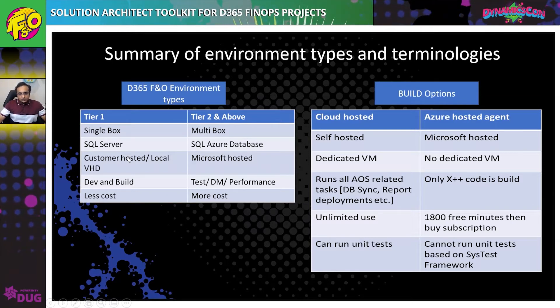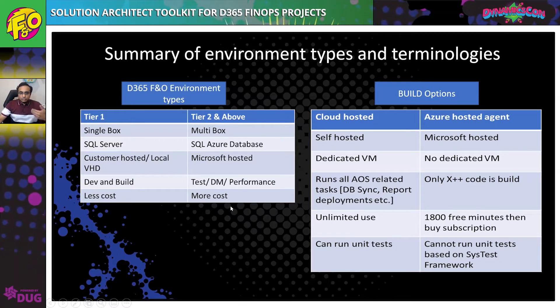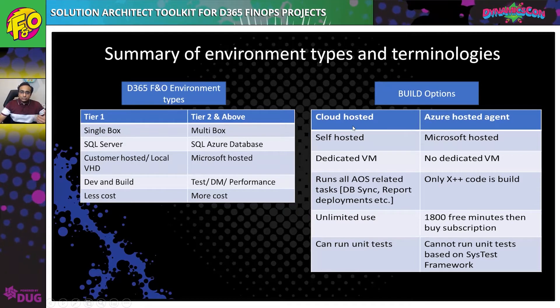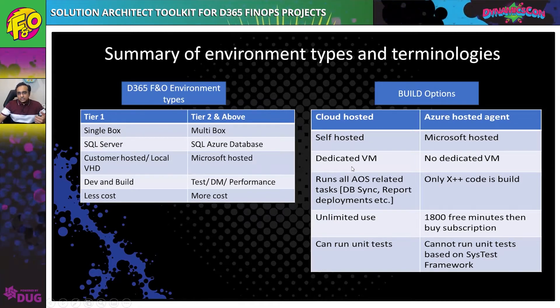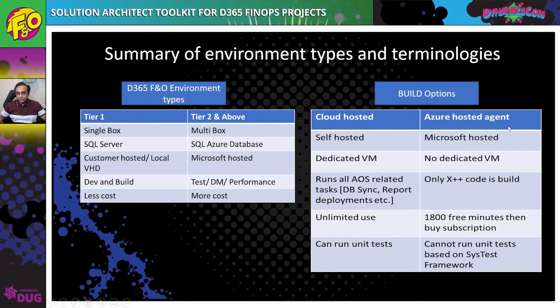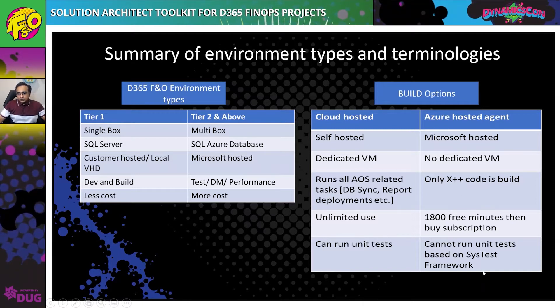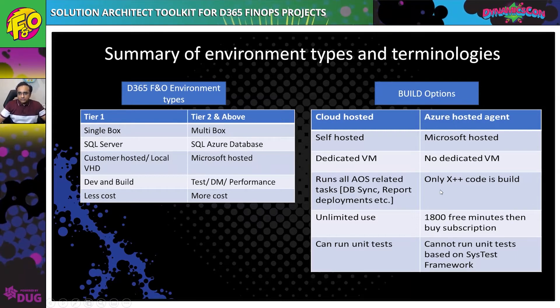Tier 2 and above environments are hosted in the Microsoft subscription, meaning you pay a fixed price rather than pay-as-you-go. Tier 2 machines are more costly, so it is important to plan for them in advance as it also takes some time for Microsoft to provision them in your LCS instance. When it comes to building code, you can either host your own cloud VM as a Tier 1 build machine, or use Azure-hosted build agents which is the new serverless approach. The caveat with Azure-hosted agents is that you can only build X++ code and cannot run Sys Test unit tests — if that's not a problem, Azure-hosted agents are recommended. Solution architects should understand these differences and decide with their technology architect what's best for the project.